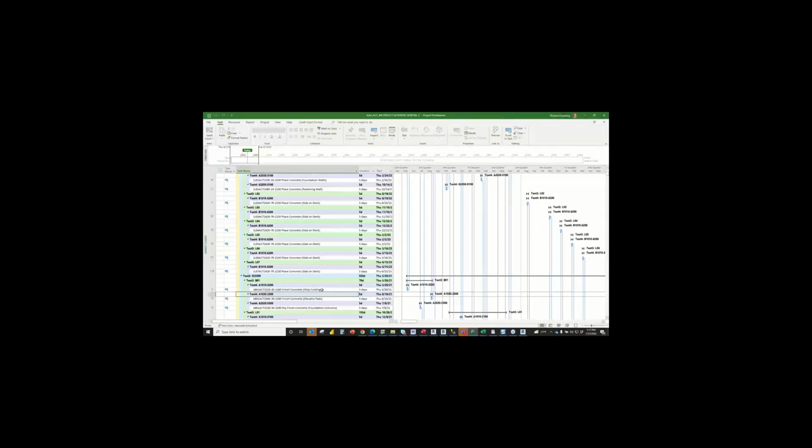And if you have two tasks, you can link it to that same spread footing element. It'll just turn on twice. The same can be true for, say, a brick veneer on metal stud wall with chipboard on the inside. I don't think that wall just kind of turns on once. There's multiple tasks with multiple trades.